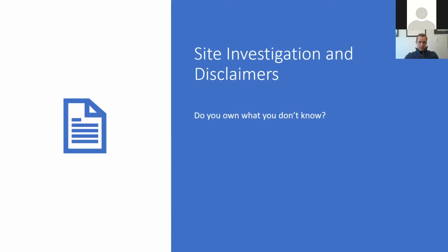If you have a site investigation clause and you represent the owner, you're going to say, listen, I gave you a chance to investigate this fully. If you had any questions, you were the expert. If you had any questions or you needed to take measurements or calculations or you weren't sure about certain things, then you had your opportunity prior to entering into this contract, and you've in fact affirmed in the contract that you've investigated the site and you were satisfied with its conditions.